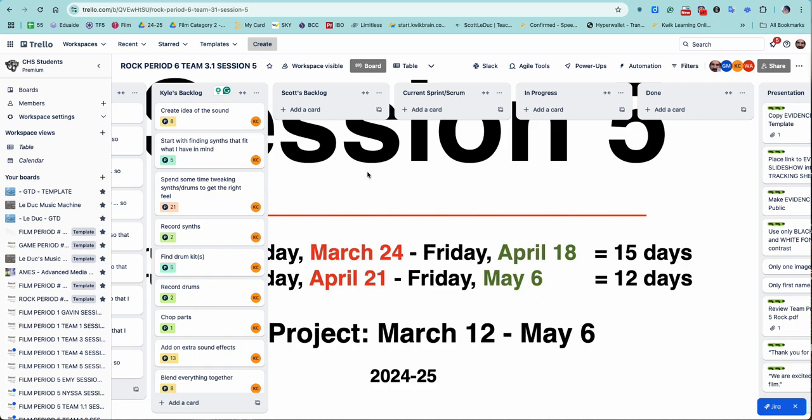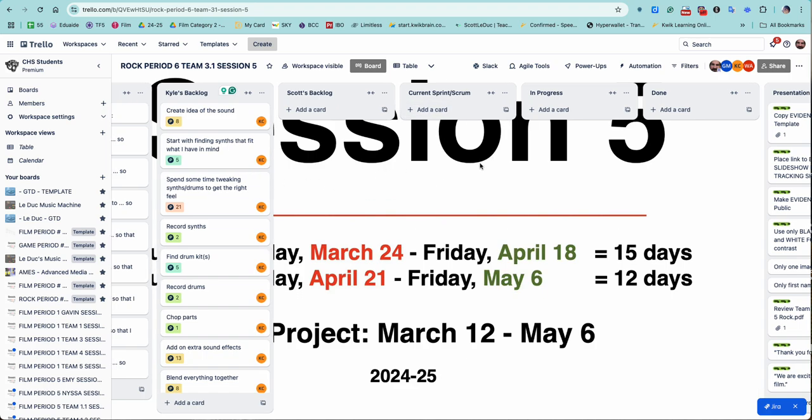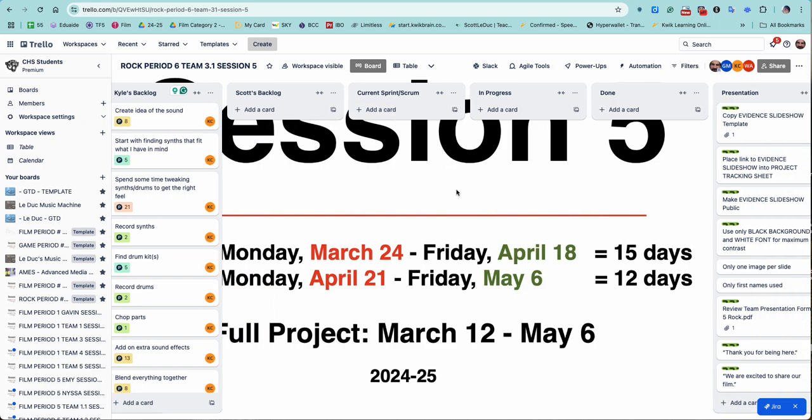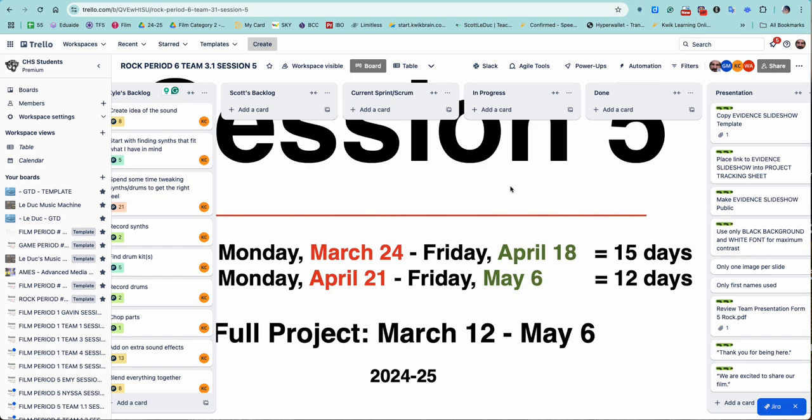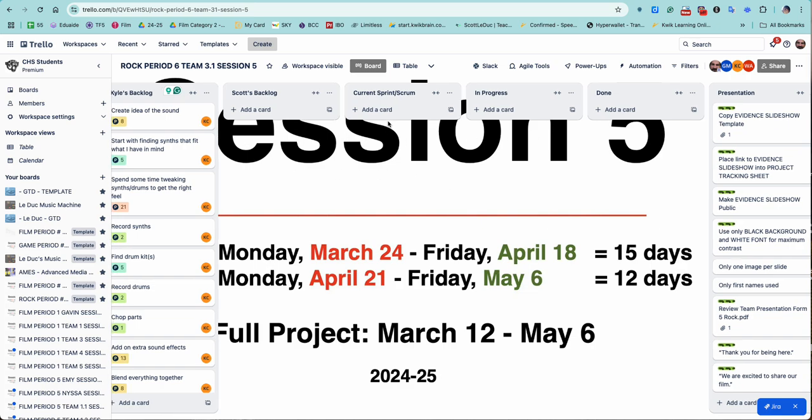And each day, so in your current Scrum, each person will have all the stuff they think they can accomplish by April 18th. That total number will be at the top of the first column on the burn down chart. Then each day you're working on things to see how things are coming along. Now granted, again, each person's accountable to themselves, but I still want you to go through the burn down chart process, the daily conversations about what is in the current Scrum, progress and done. Just we're exercising that muscle.